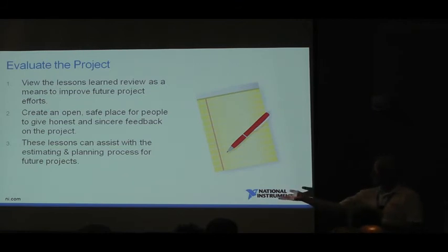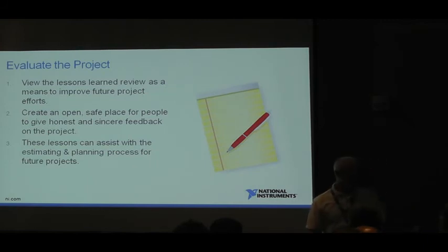But to Ryan's comment earlier, if you're putting in your timesheet, if you're tracking time to the tasks that you're working on, now you've got that data at the end of the project, and you can compare actuals to the plan and see how you did. This is especially important on fixed price projects, for estimating for the next fixed price project. This is not a witch hunt. You're not trying to get anybody in trouble. It needs to be an open, safe environment for honest feedback.